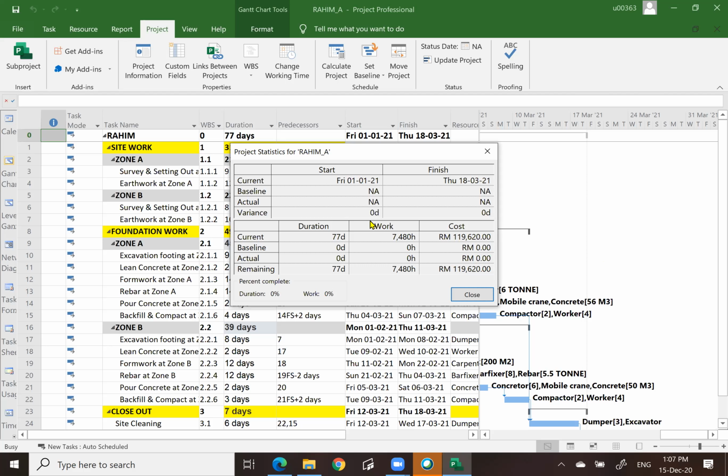When you do tracking, you must set the file with a baseline. Baseline is like you take a selfie of this file or all the data, because if you want to make a comparison between plan versus actual, the plan values or whatever data must be logged first. Then only the computer can make the comparison. It's just like taking a selfie of yourself, now and after.